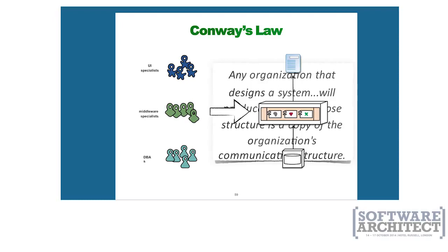Here's a cartoon reprinted by request, and it's actually funny, but it's also accurate. Because Amazon created this concept. So we've known since about 1975 what the optimum size for a software development team is. Between 8 and 12 people. Fred Brooks identified that in Mythical Man Month, and he did this by looking at an analysis of more than about 10 people on a software project, and the communication overhead starts being more than 50% of the time you spend on the project. And so there's an optimal sweet spot number.